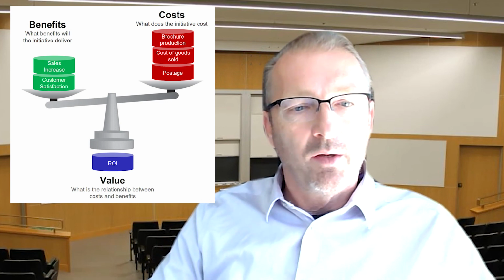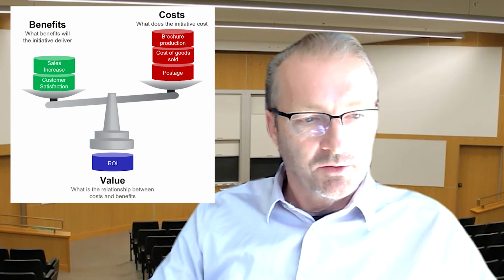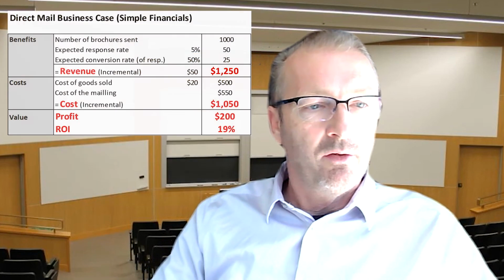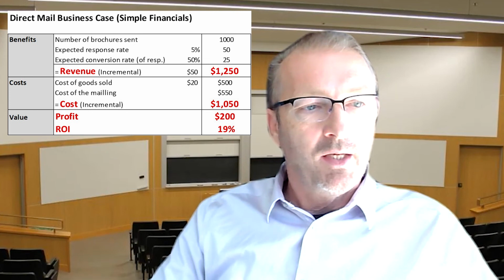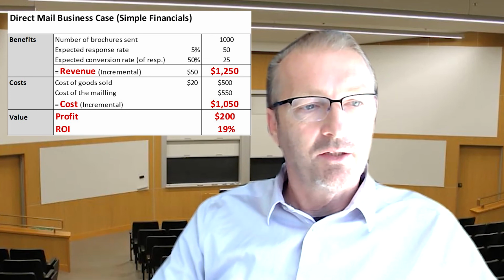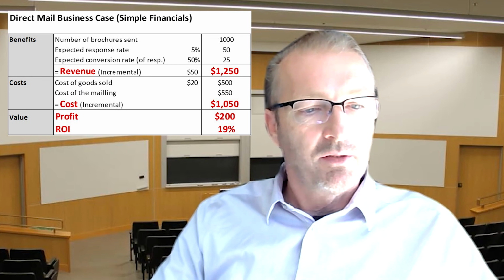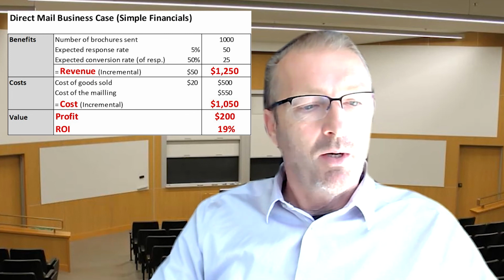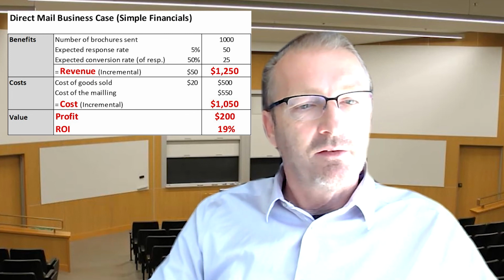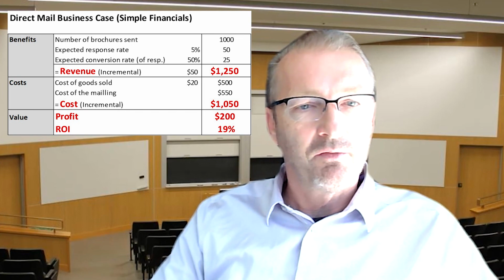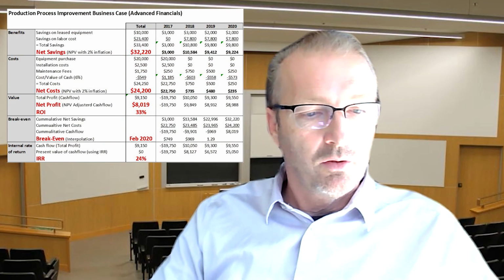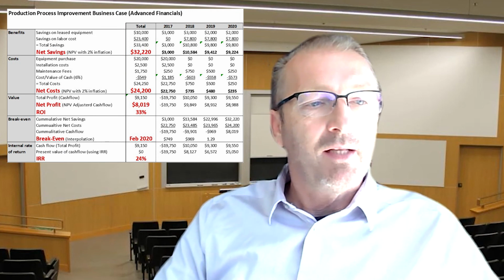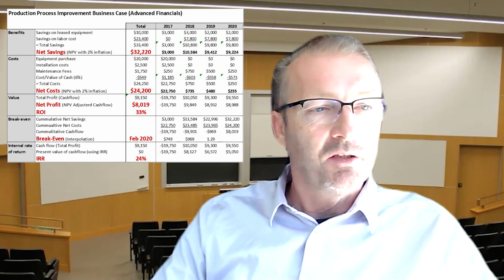So, in short, a business case is an evaluation of the costs and benefits of an initiative and whether the benefits outweigh the cost. Most companies are using a financial business case to estimate whether an initiative is good or bad. So they look at the financial benefits, they look at the financial cost, and if the resulting value, for instance measured in net profit or return on investment, is positive enough, that will mean that the proposal or the initiative gets approved. If the value, so the return on investment, or maybe even the break-even time is too long, then that will mean that the company might not engage in the initiative.